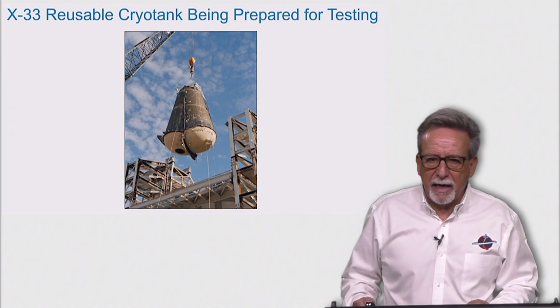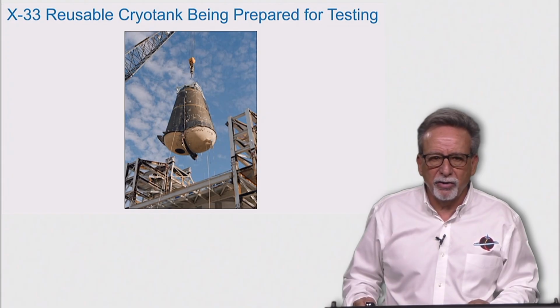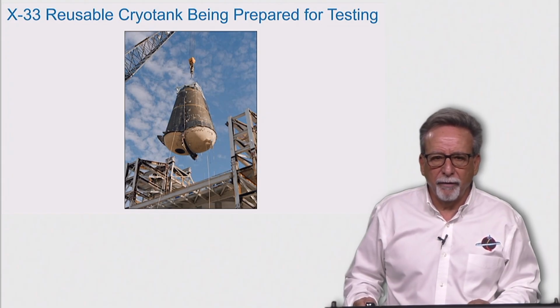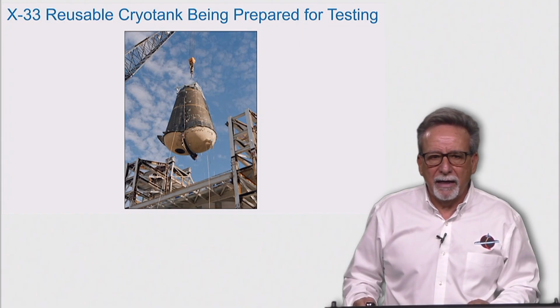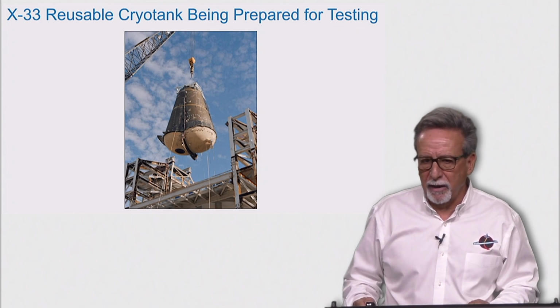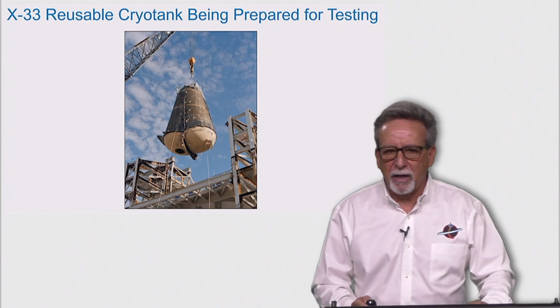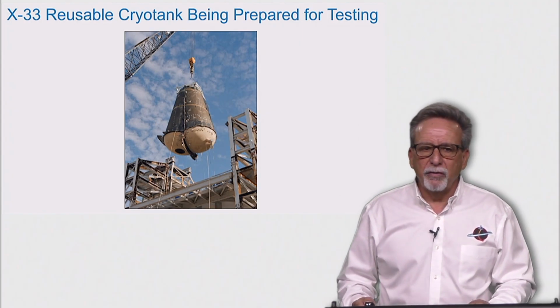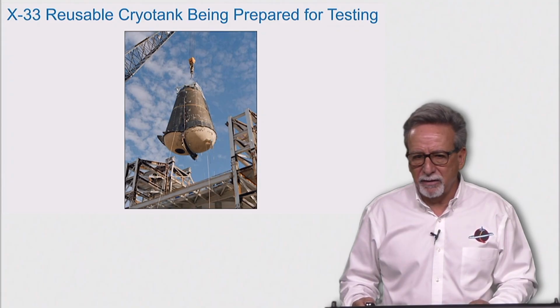The failure of this tank late in the program resulted in the entire cancellation of the X-33 program. It was a shining example of what not to do and is the reason for the development of advanced product development strategies, which we will present as part of the ICE methodology at a later lesson. We call these strategies rapid concept development, and they use many principles of set-based design.